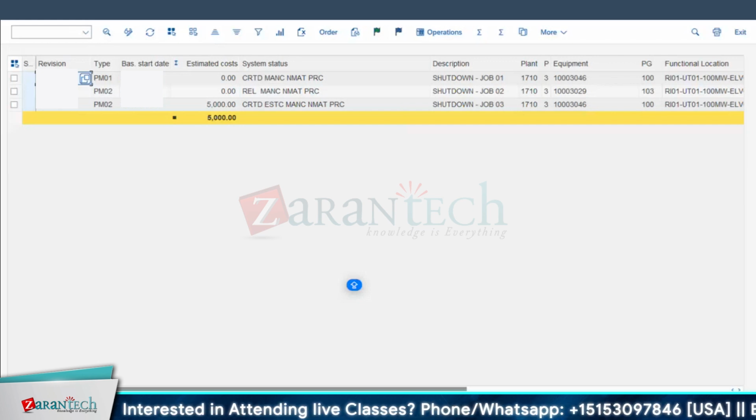Normally, you create an order and complete your job; it has nothing to do with your shutdown. I think the revision number has to be assigned, sir, and the rest of the orders will follow the normal cycle. Wherever we have assigned the revision number, only those fall under it. Technically, for example, now we will give a shutdown job to a third party, right?